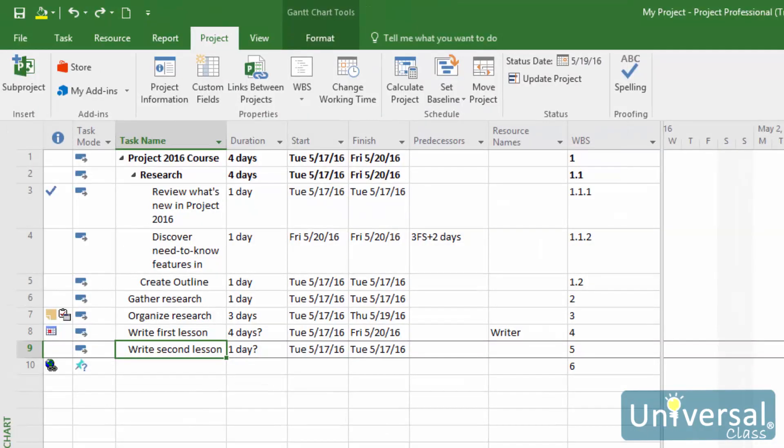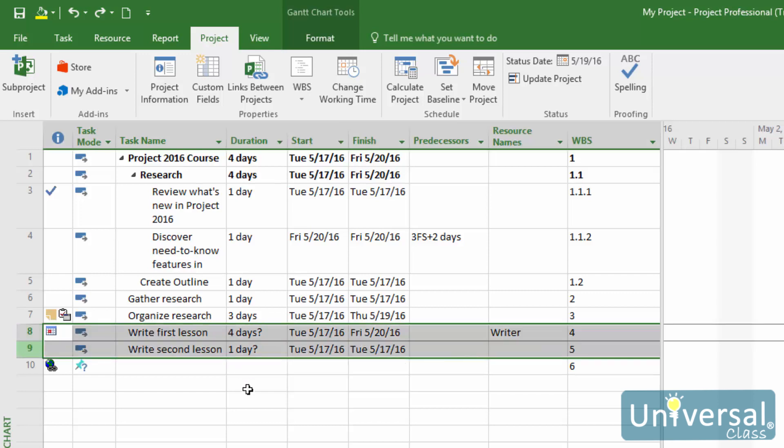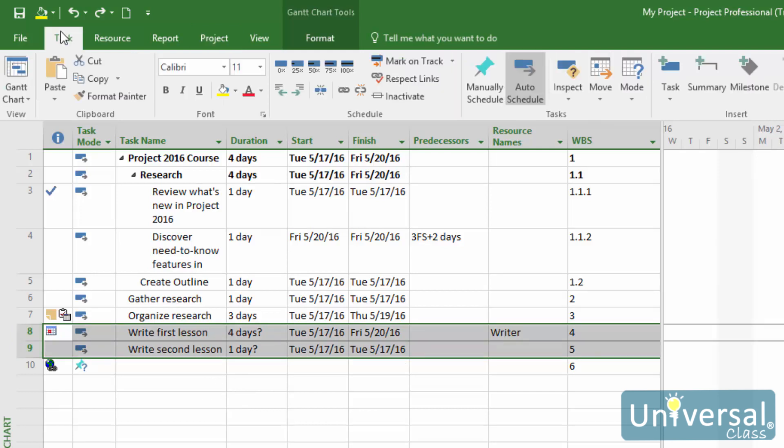When you are trying to enter a project status and you notice that a task will be on schedule as of that status date, you can mark the task as part of the way complete as of the status date. To do this, select the tasks that you want to update, then go to the Task tab and click the Mark on Track button.